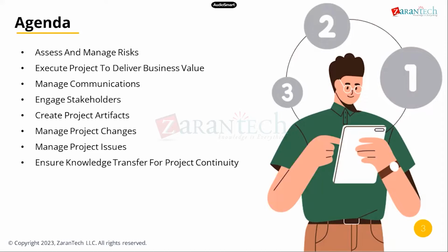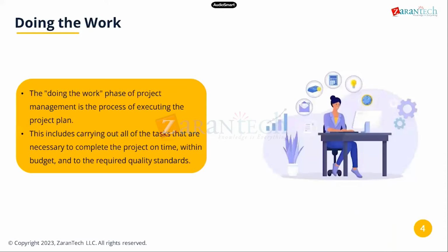One by one, we'll see each of them. First one is for doing the work. Here, from the SAP project point of view, we'll have 4 phases like executing software configuration, data migration, user trainings, or system deployment. When we say executing software configuration, like SAP software, based on business requirements, a system design has been implemented. Or data migration, transferring existing data from legacy system into new SAP system and ensuring it integrates smoothly.